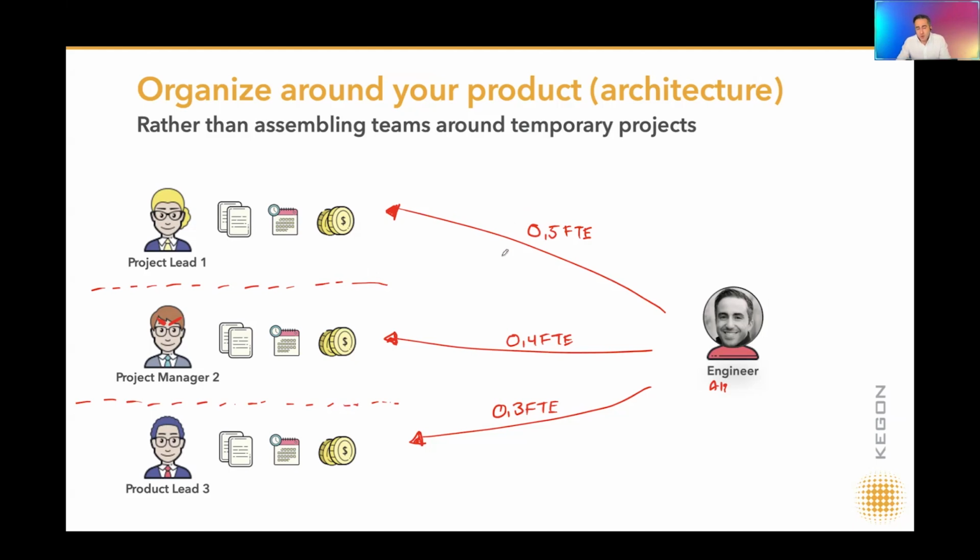So switching to another project is inefficient. It's a lot of time involved switching back and forth. And that is switching time. Switching time is just inefficient. And that builds inefficiency in this system. And whenever I'm just busy with project number two, all of a sudden I get a request from project lead number three that something is burning at the customer site, which also means I need to drop everything that I have in my hands and I need to focus on anything related to project number three. And then the same thing applies. So it's a very haphazard way of working, which can become very nasty.